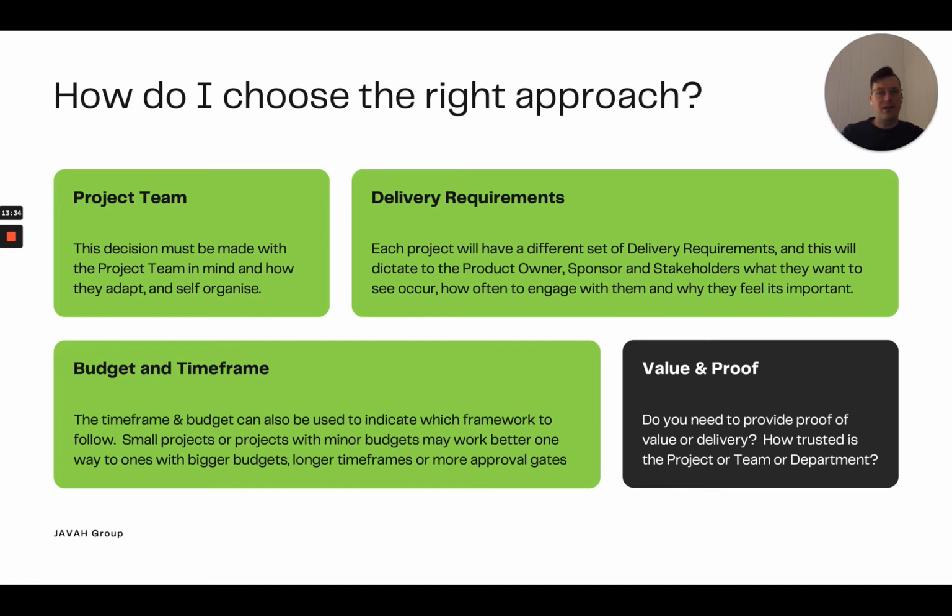And so it makes it really clear to be able to fill up your time boxes and come back with a plan and say, okay, as a team, we've sat down and we're going to do these 2-week cycles. There's going to be 5 of them. At the end of the second one, we'll deliver A. At the end of the third one, we'll do B, and at the end of the 5th one, we'll do C, and there it is.